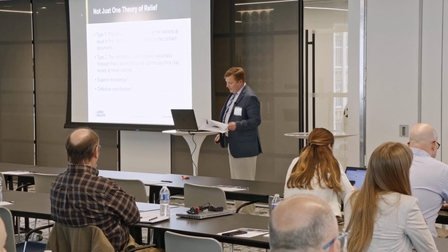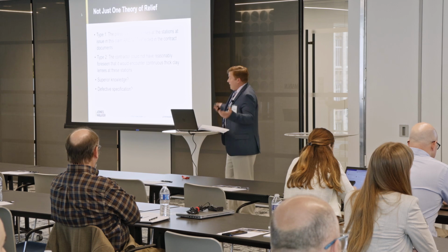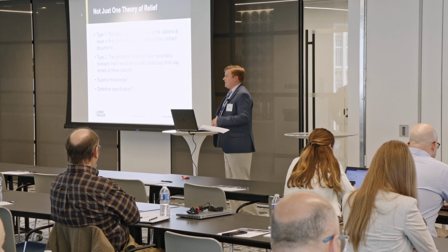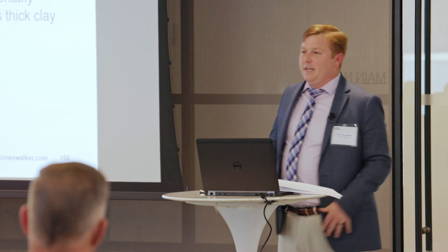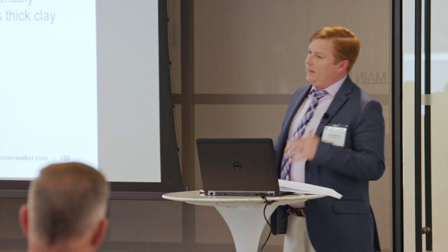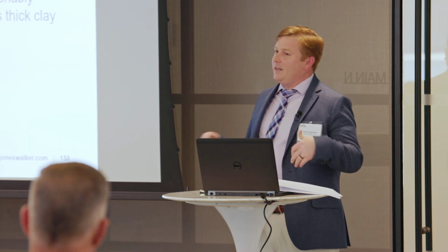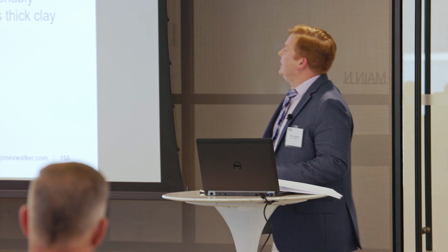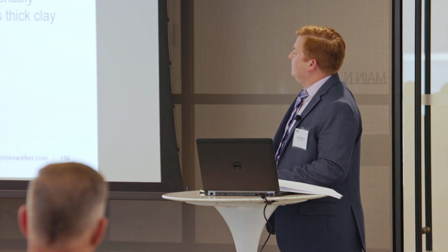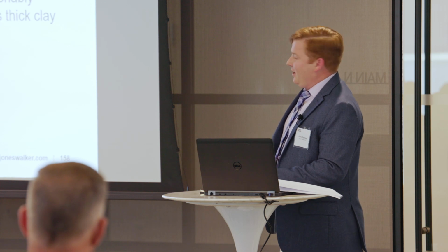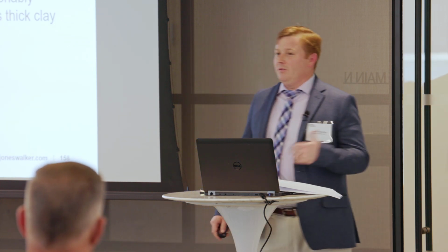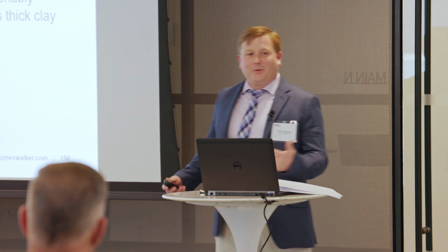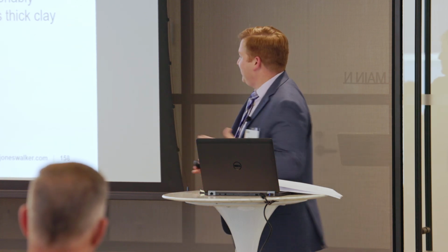So, for a type 1 claim, obviously we said the presence of continuous clay lenses was not reflected in the contract documents at the particular stations that we were digging. But in reality, the contract documents did indicate that we would probably encounter clay at some magnitude. It was going to be a tough road. Type 2, even tougher, right? That we couldn't reasonably expect clay to be at this site. Well, it's a riverbed. So we had real problems with that one.